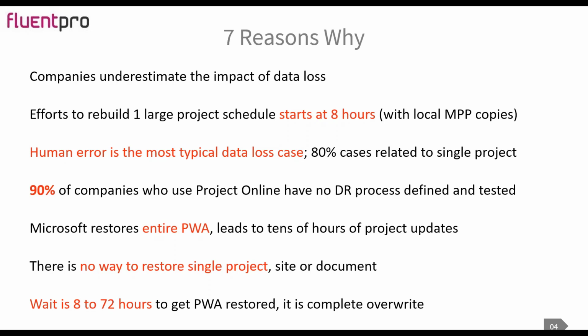The majority of organizations who use Project Online do not have a disaster recovery process, and then, as I mentioned, there is no way to restore a single project in Project Online by just using the standard way of posting a ticket to Microsoft. Then you will need to wait up to 72 hours until Microsoft restores the whole PWA to you, and that would not be an individual project.